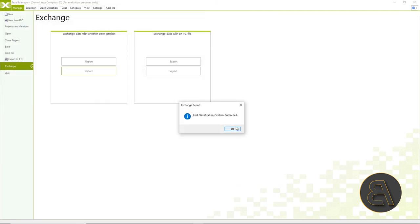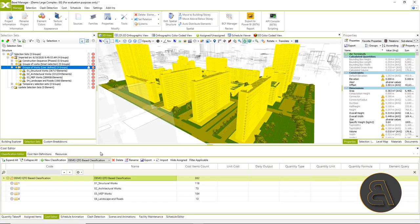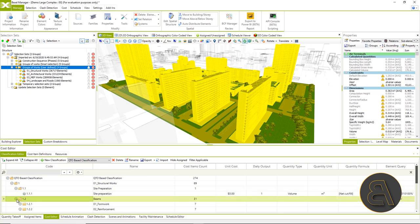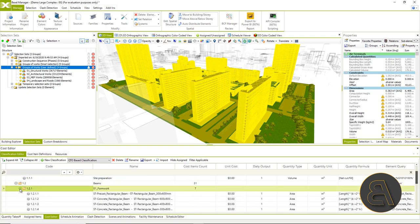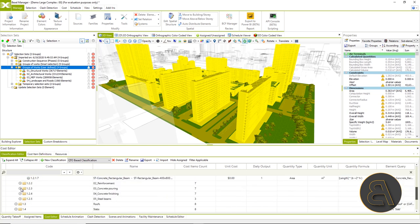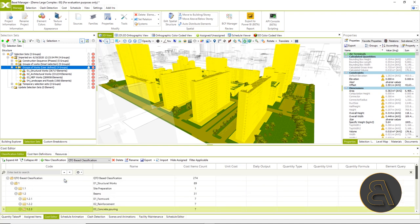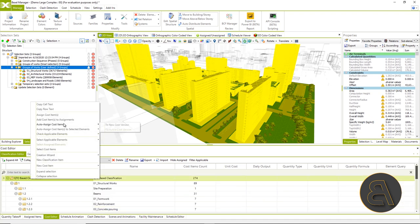We will now connect the created structure for BIM model elements in just one click. So now our elements are linked up to the created cost database based on the automatically created BIM queries for each cost item.